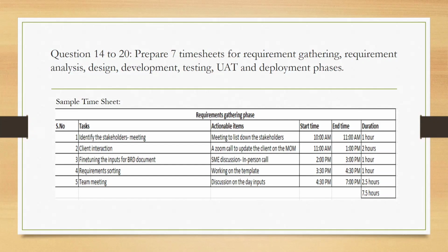It applies to the organization people, whoever is involved in this project, like developers, testers, network admin, and DB admin. They will update the timesheet there. For example, the development team: as business analysts, we will assign the functional and non-functional requirements to them. So they will update their timesheets, like, I have completed this functional requirement and taken 2 hours, and for the next functional requirement, 3 hours. They will mention what work they have done and how much time they have taken.